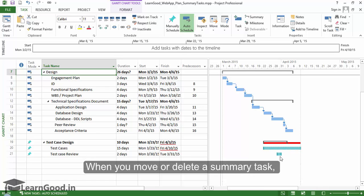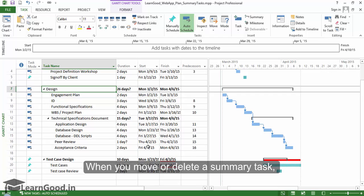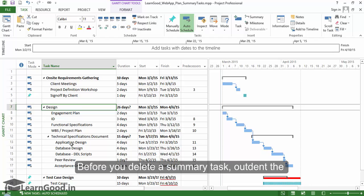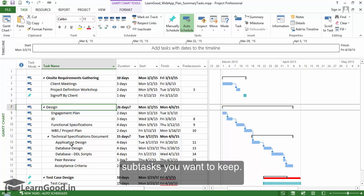When you move or delete a summary task, Project moves or deletes all of its subtasks. Before you delete a summary task, outdent the subtasks you want to keep.